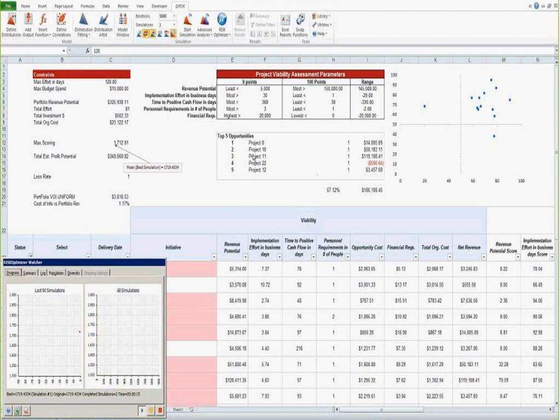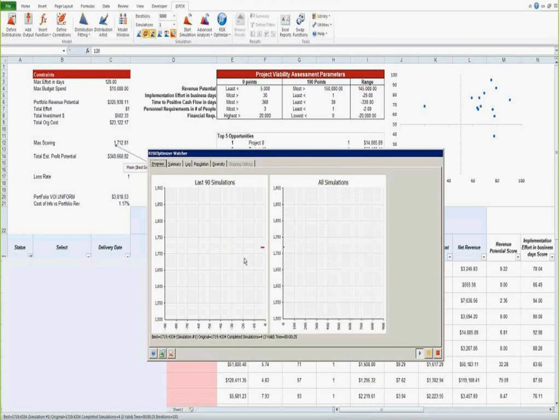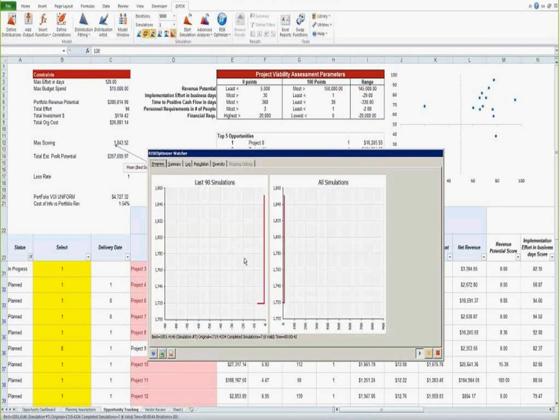And this is what we're looking at here. So if you let this model run for about a half hour, it will stabilize at 1,000. Mind you, 250 trials is not bad, using Latin hypercube, because it's stratified sampling. And if you let this run long enough, it will increase it, and it will give you the max point scoring, and it will respect how much value of information, how much effort you can do, and how much budget, which are basically your multiple dimensions.